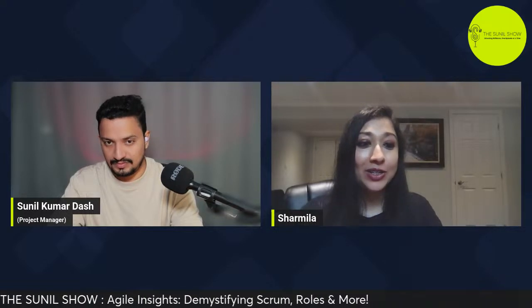Now, in terms of Jira, Jira also wants you to give the original estimate in terms of hours. One question that normally comes up is, can we estimate the user story in terms of hours? Well, again, based on the experience of the development team, a developer can take, let's say, 5 hours to complete a user story. Another developer can take 10 hours to develop the same amount of work. So it can get really confusing if you are trying to estimate the user story with hours.